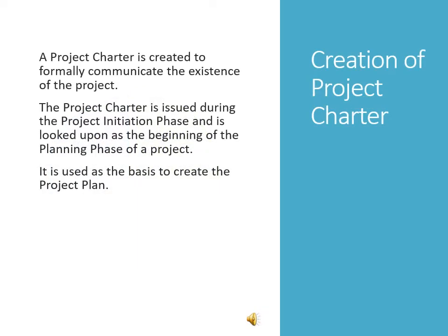The fourth item, which I consider as very important, we are talking here about the creation of a project charter. In fact, a project charter is created to formally communicate the existence of the project. That is, you are telling people what your project is all about. The project charter is issued during the project initiation phase and is looked upon as the beginning of the planning phase of the project. It is used as the basis to create the project plan.